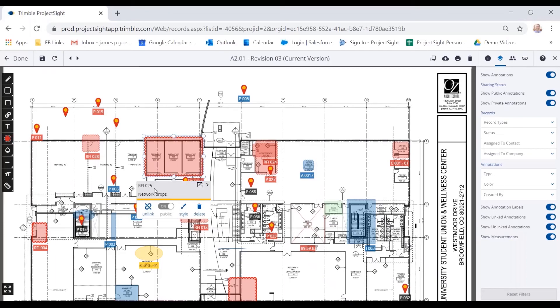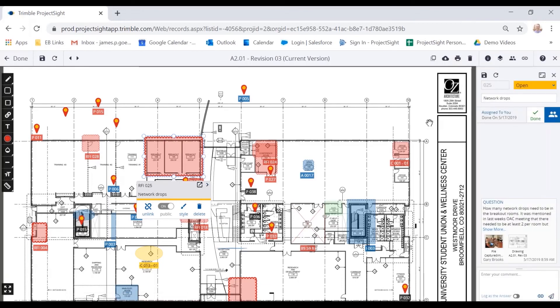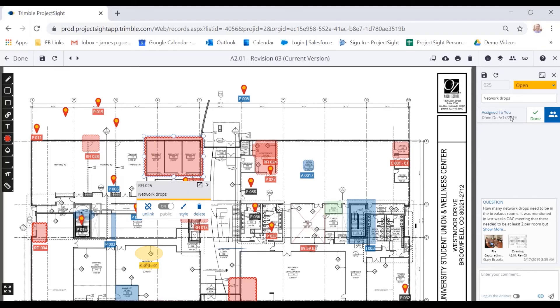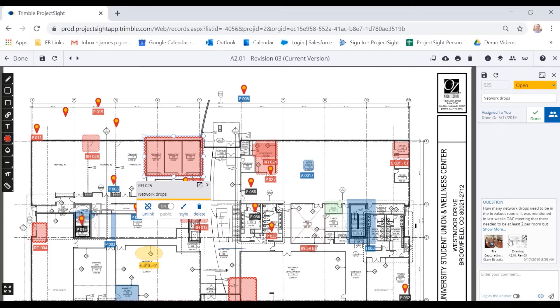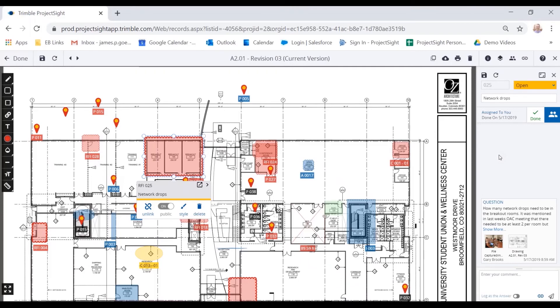So let's take a look at a couple of these. I'm going to start here at this RFI. So this is an RFI added to the drawing. I'm going to click this little arrow and that's going to give me the ability to open that up on the right side without leaving the drawing. So I have the ability to quickly look at different things without going back and forth between the drawing and the RFI module. Now on the right side, I can see this is assigned to me. It looks like there's a quick question here about network drops. There's an image included as well as the reference to the drawing. So I can quickly come in here and make my comment. I can log that as the answer. I can change the status and I can complete that specific item right here on this drawing screen. Everything you see here can be done within the iPad on the iPad app. So I can be out in the field walking around. I can notice a specific issue and I can track that right here on the drawings and pin it to the drawing set.